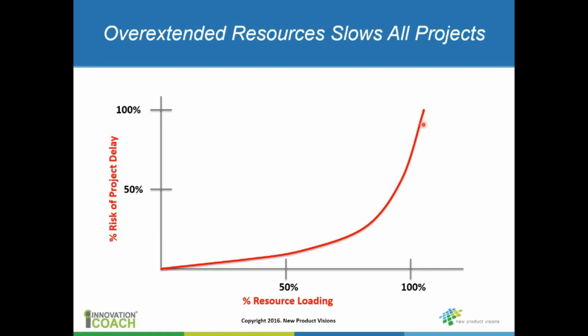But there's a trade-off. There's a sweet spot in terms of how loaded you are, and really it depends on how important it is for you for the projects to be on time. So you do pay a penalty when you're up at 100% in terms of late projects, and so you just have to have that expectation. And the only way to really get out of that is to have some slack in the system. So you really can't have it both ways.